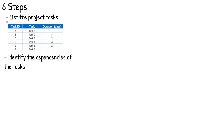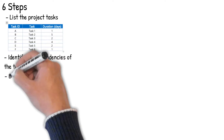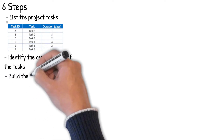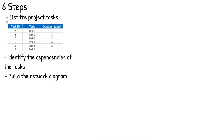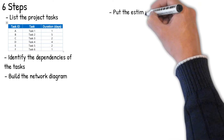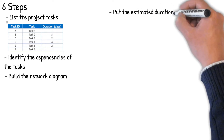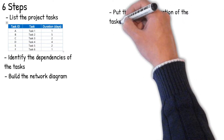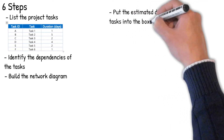Once you have this information, it's possible to start building a network diagram. Within a network diagram, each task is put into its own box or circle, and arrows between them are used to depict dependencies.